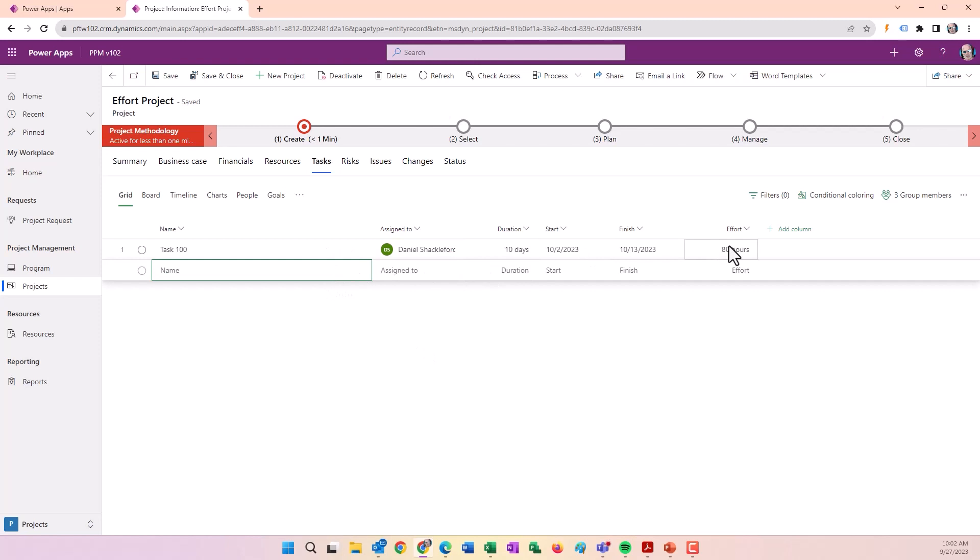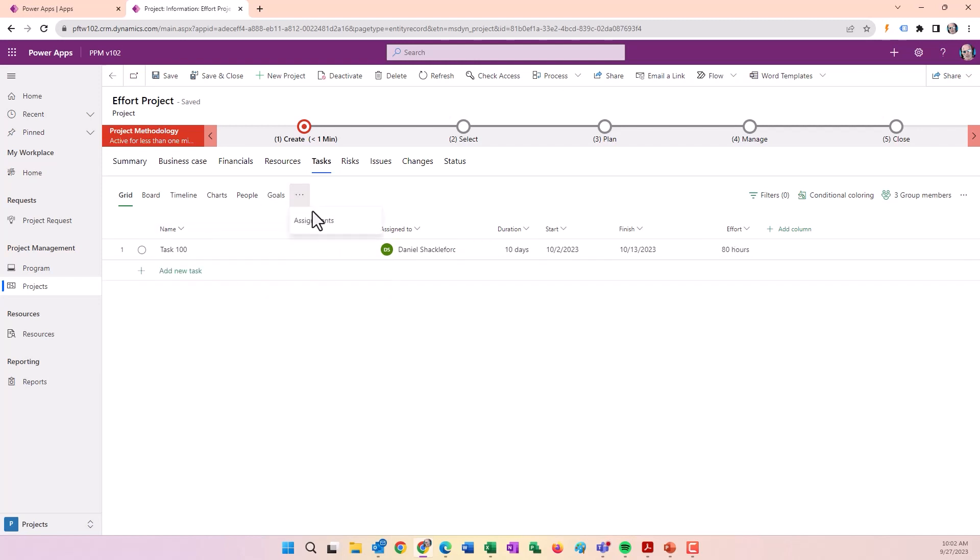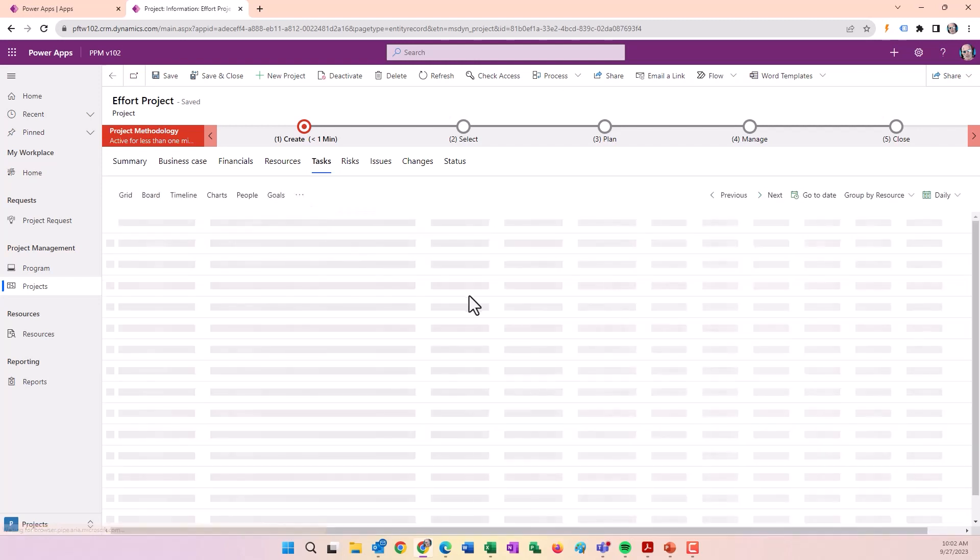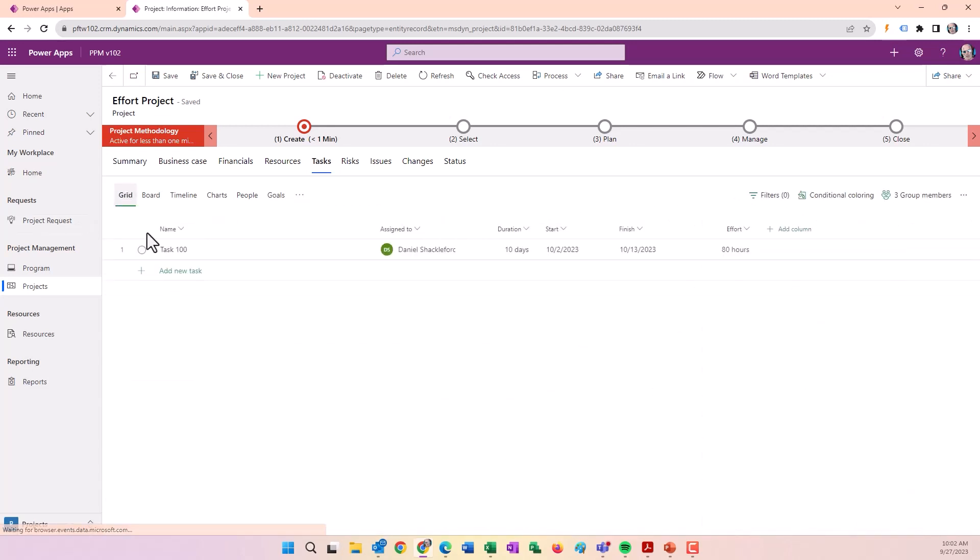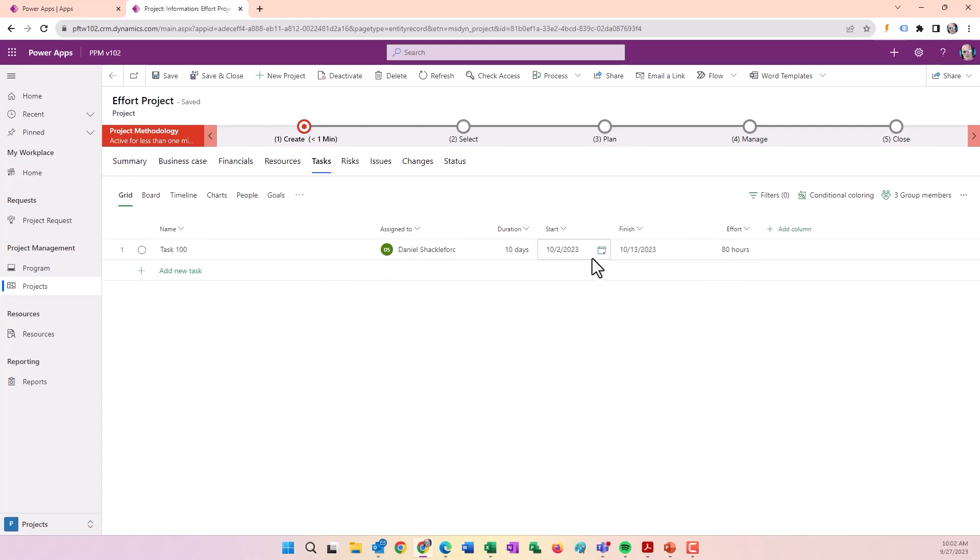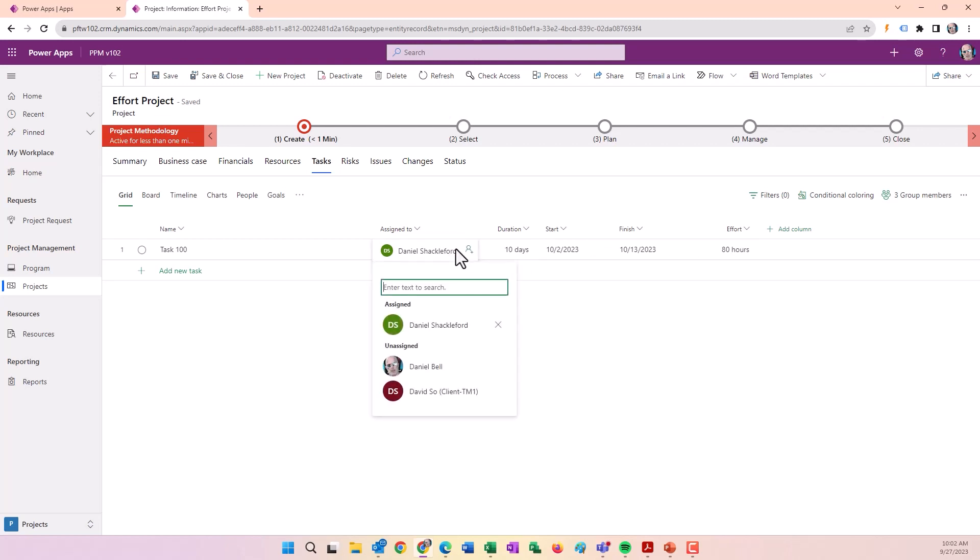The duration went to 10 days. If we look at the assignments, it's assuming the person is working full-time over the course of 10 days. That's because we fixed the effort.